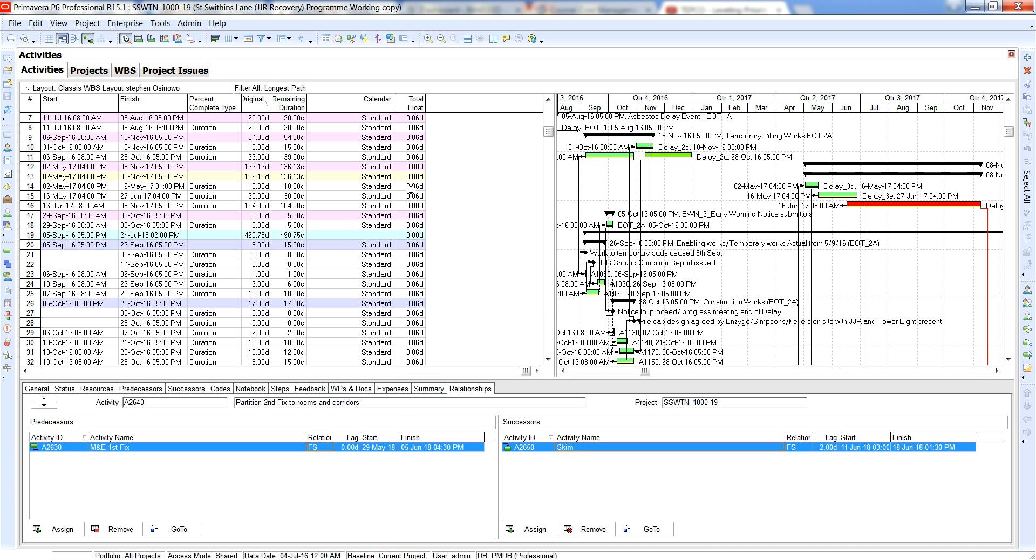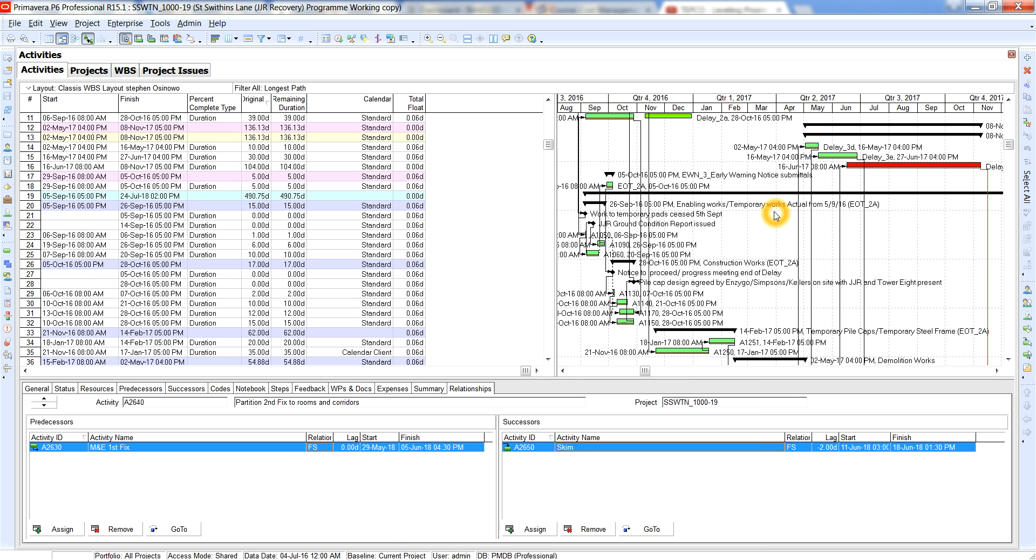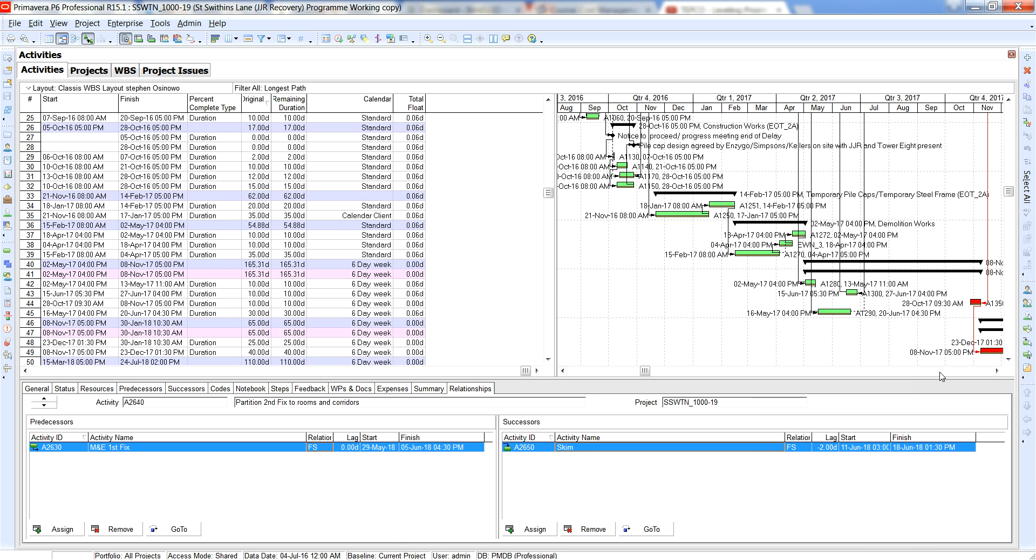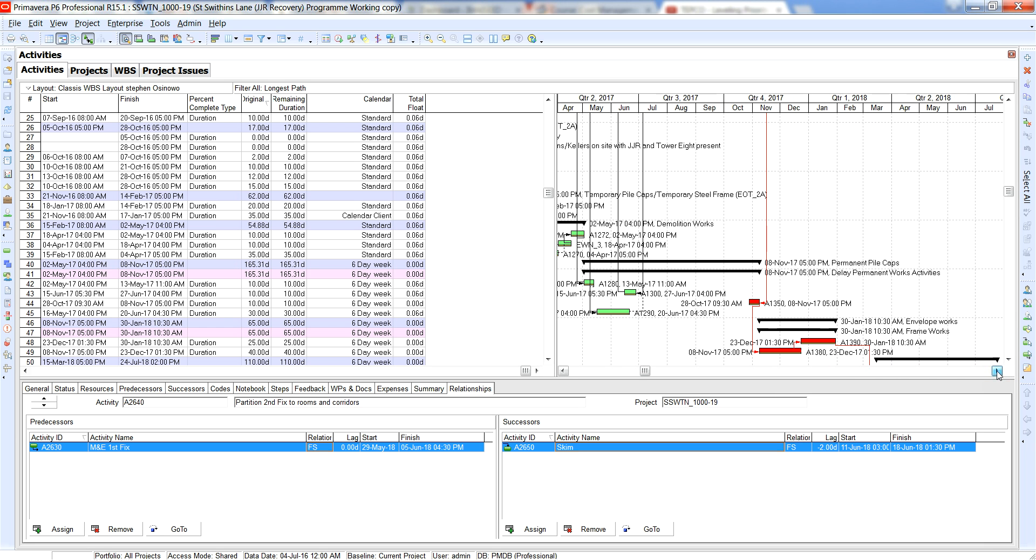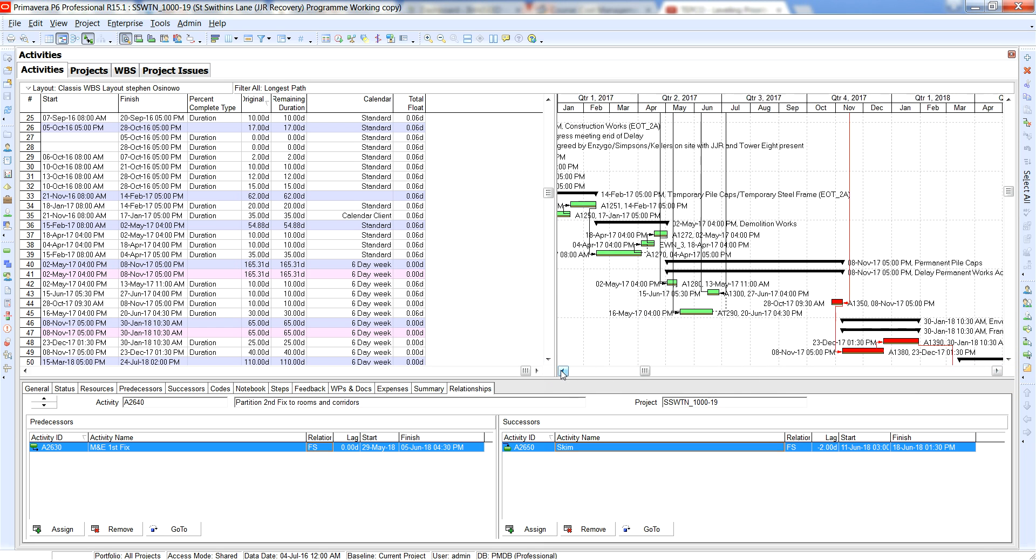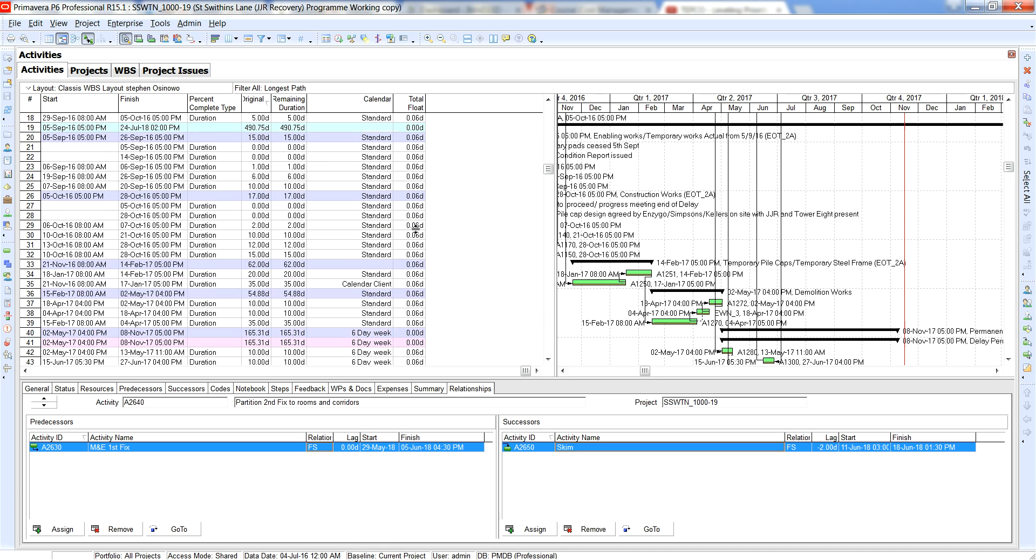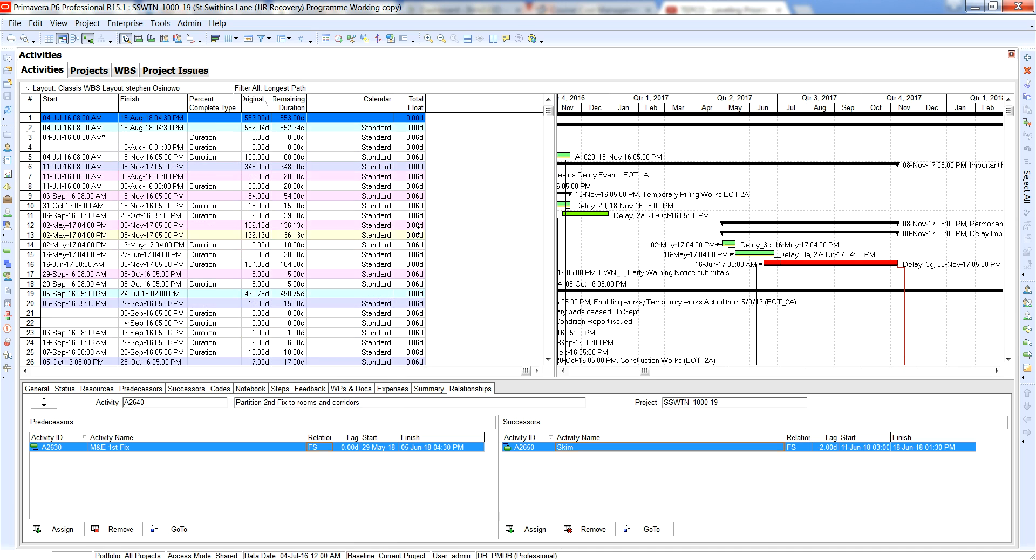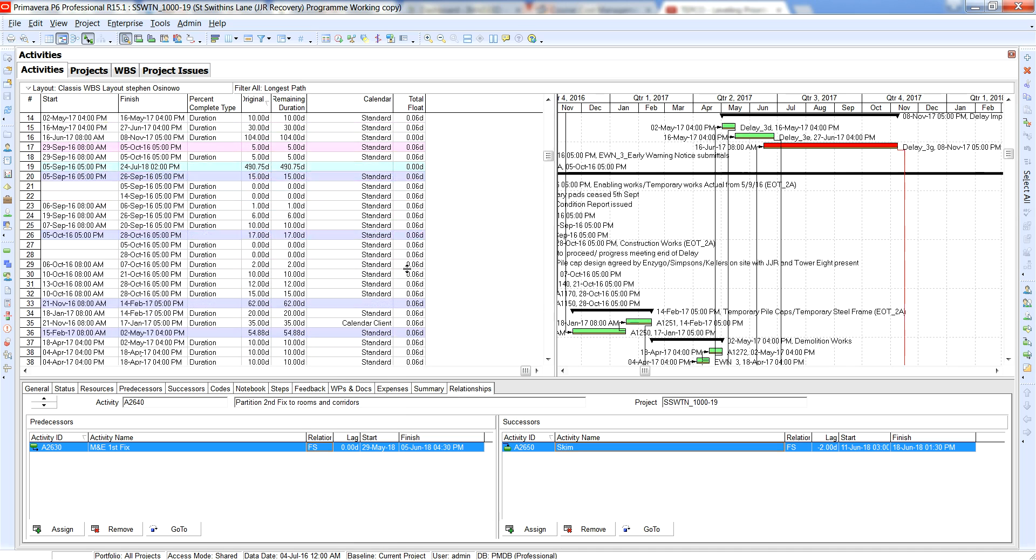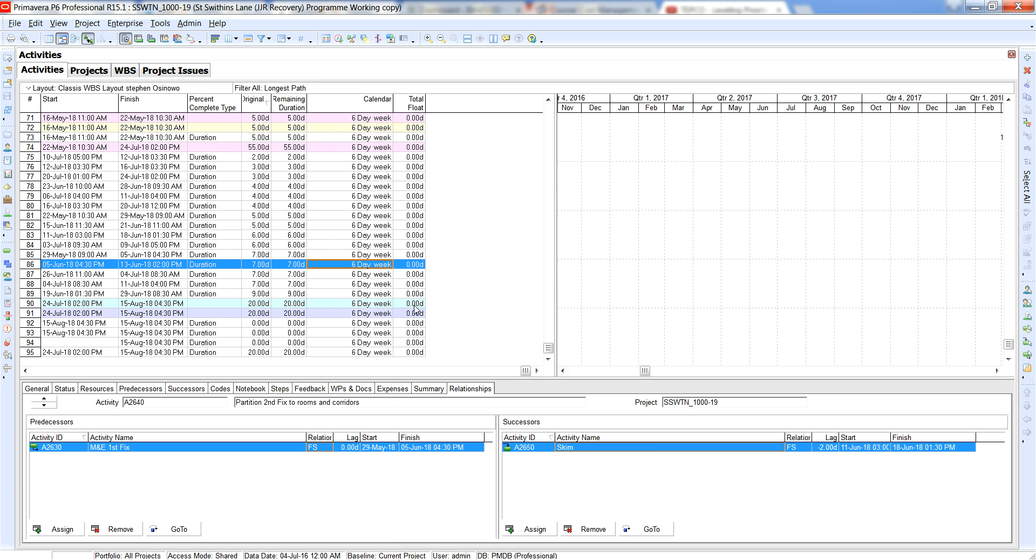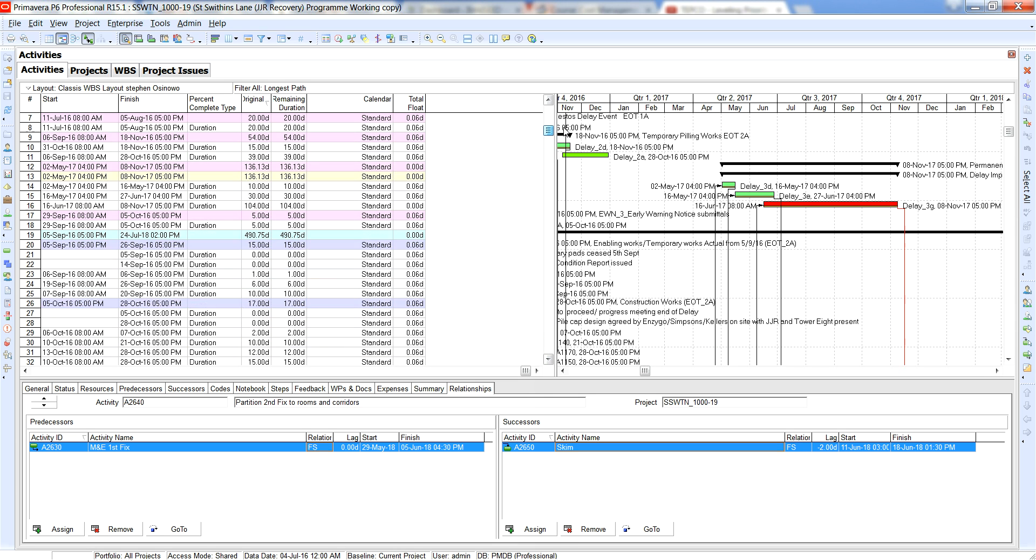As you can see here we have the longest path and you have all of these critical activities which if you analyze them a little better you can see that some of these are not critical, these are critical, but then regardless of that majority of the total float values as you can see is 0.6 days, 0.6 days all the way down. So ideally we want to be looking at the longest path as the true critical path on any of your programs.